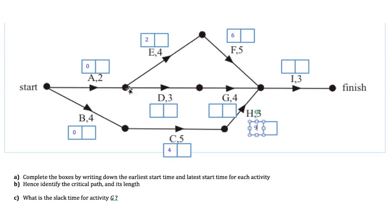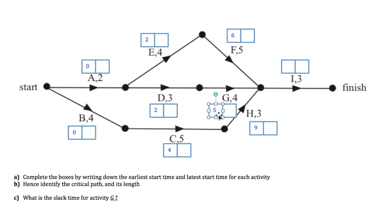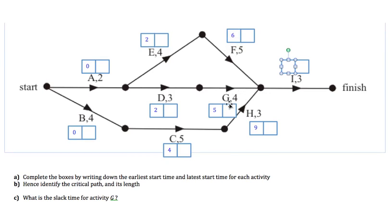We still don't have enough information for I yet, so we'll fill in the middle paths. A takes two to complete, so D, which can start after A is finished, can start at two. D takes three, so two plus three gives us five, meaning G would be ready to start at earliest five. Now for Activity I: it has to wait for F, G, and H to all finish. F finishes at 11 (six plus five), G finishes at nine, and H finishes at 12. The latest to finish is 12, so I can't start until 12.